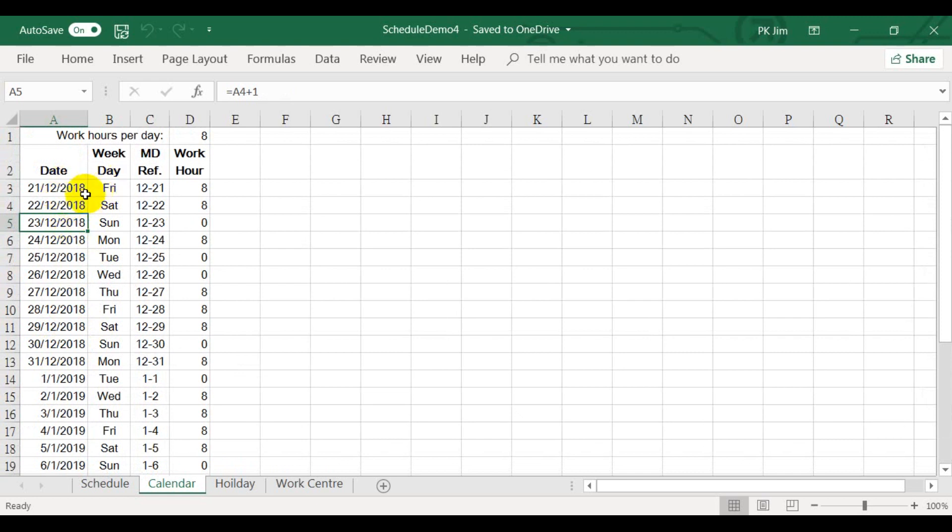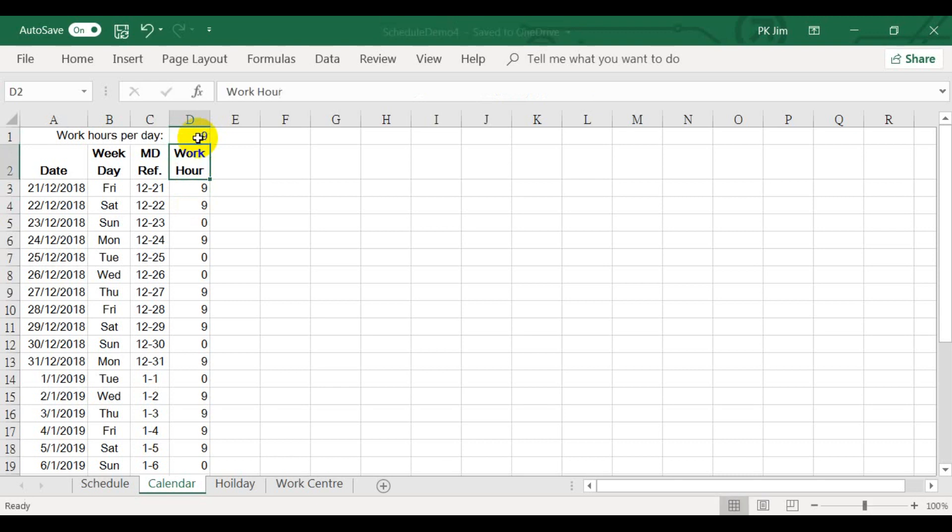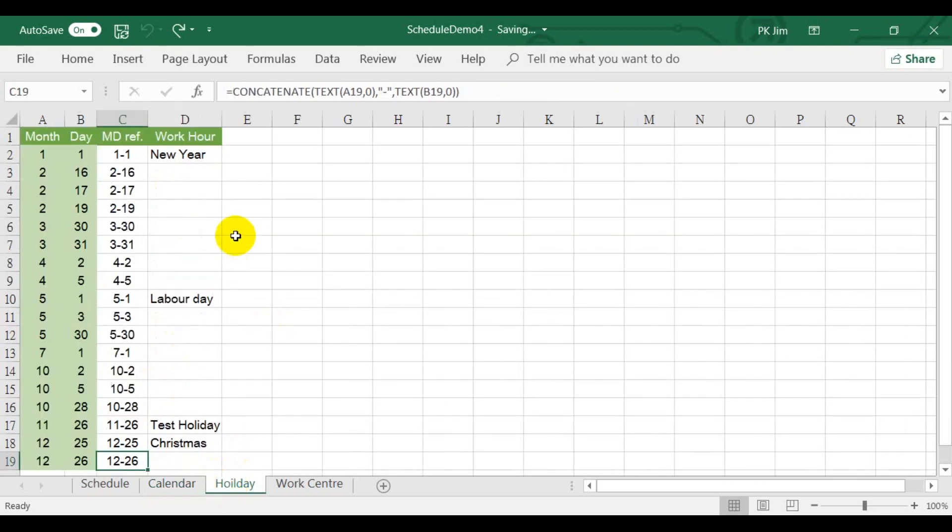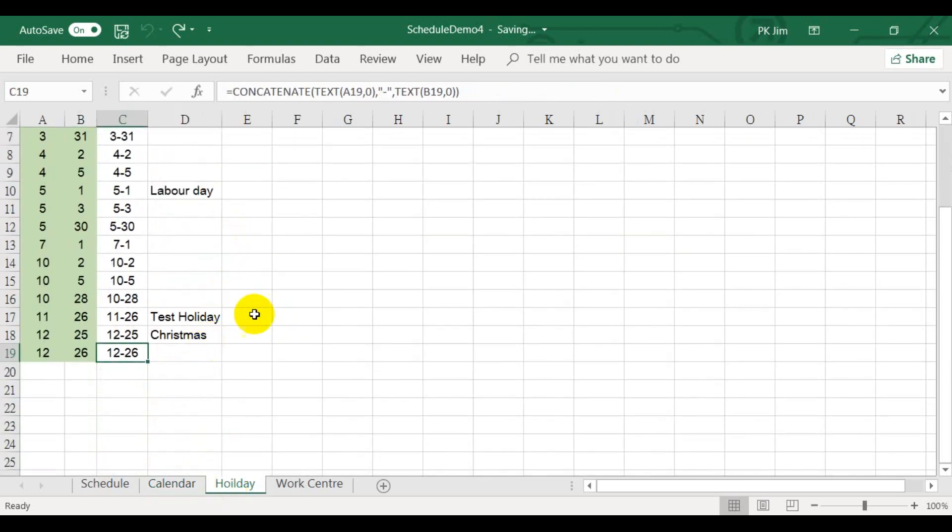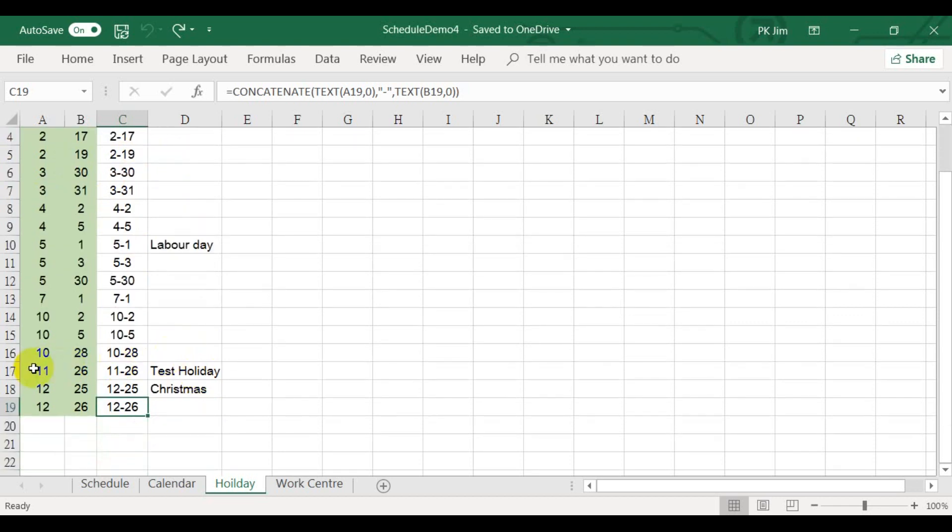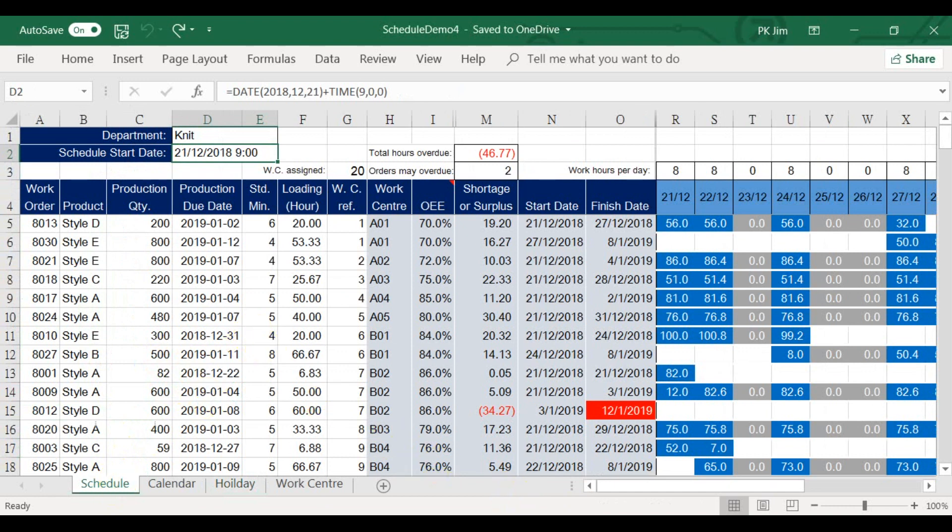It will also define the weekday. You can input the number of work hours here. If you want it 9 hours per day, just input here. I have set all Sundays to non-working days so no need to define one by one. You can also define holidays here. Just define month and day of the holiday. Then you can create some common public holidays such as Christmas and New Year.